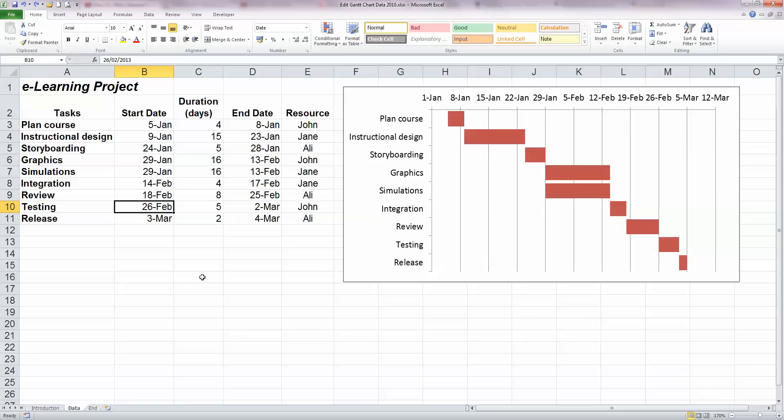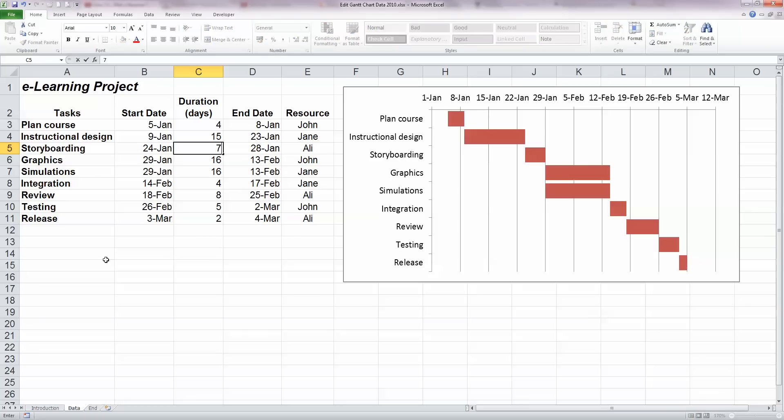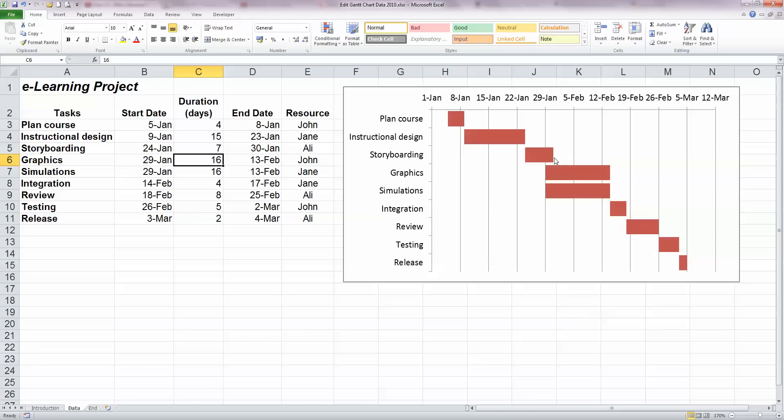Now these changes are also reflected on our Gantt chart over on the right hand side as well. Let's take a look at the 3rd task, which is storyboarding. If I increase the duration from 5 to 7 days, as I had done previously, so let's put in 7 here, we can see that the actual bar representing the task of storyboarding has also increased in size as well as our end date changing here as well. So we have a visual and a date change occurring on our chart.